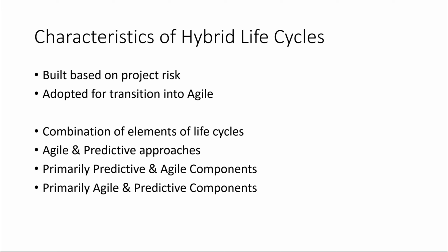A consultant helped to integrate the FDA approval process portion into the agile development process to create a more streamlined hybrid approach. The short version of the story is that because FDA approval is required to be completed at the end of the development process or repeated after any change, the process had to remain at the end as a separate phase. Integration using an iterative process was unsuccessful. However, the consultant created some useful quick start guides and testing protocols that shortened the final FDA approval process.